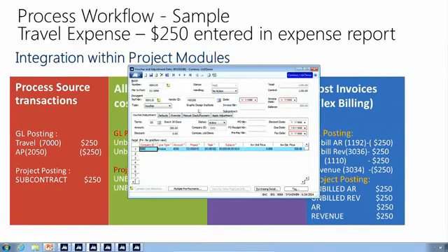So we'll go to project voucher and adjustment, and here you'll see this is an example of the material cost. Here's the account that's assigned at the time that the voucher is entered, and it's associated to a project, and you'll see the $500 as cost. So that 4030 account will flow to GL, but it also will generate a material cost on the project.